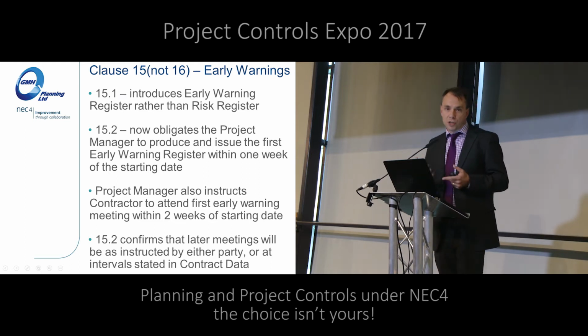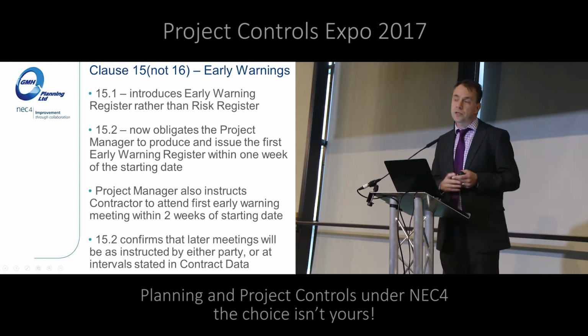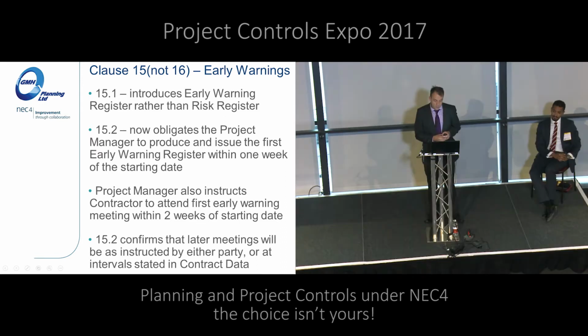So now your traditional risk registers that you've always maintained, you can do with whatever you want, have as many columns as you like, and separately we're going to have this thing called the early warning register, which is just what you've previously known as the risk register.